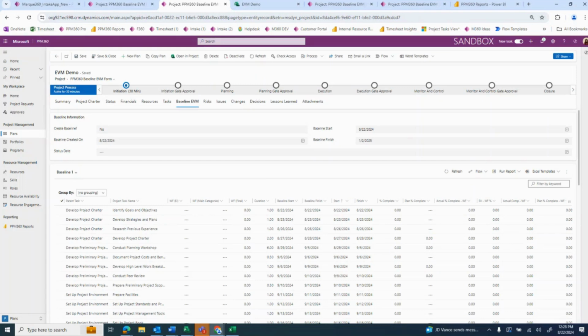As you can see, as I mentioned before, we do have these additional custom columns that are utilized to track progress schedule. In our case, weighted factor expert judgment, and we also have weighted factor main categories. Together, we'll see that these two multiplied are going to give us the weighted factor final. Now, the way that these fields specifically function are for this specific situation, but all business processes are different. So you may not need to track these aspects of your baseline schedule. In this case, these variables play into the calculation of other custom columns. As we can see here, we have a column for plan percent complete, which ties into our status date field here.